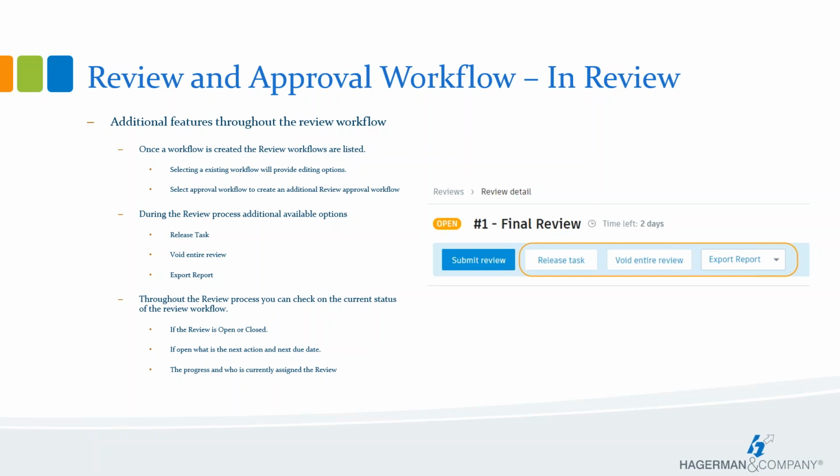We've got void entire review. This will completely void the process. If it is decided that the files may not be ready for review, this will cancel that review process. And then we have an export report to download an Excel spreadsheet containing the review details and any comments made during the review and approval steps.